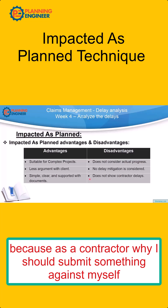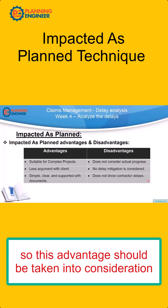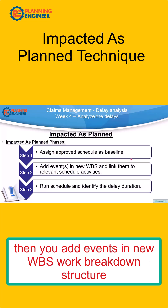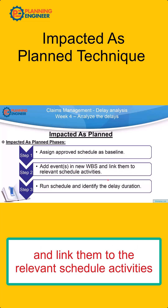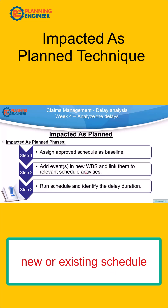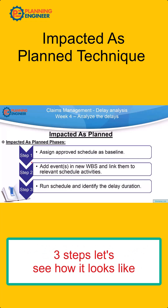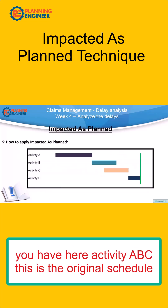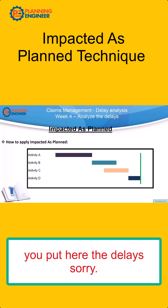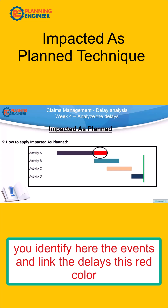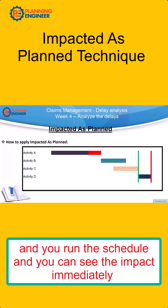Impacted as Planned is very simple. All you need to do is: assign the approved schedule as a baseline, then add the delay events as new work breakdown structure items and link them to the relevant schedule activities, then run the schedule and identify the delay duration. It is very straightforward — three steps. As shown here, you have activities A, B, and C in the original schedule. You identify the events and link the delays shown in red, run the schedule, and you can see the impact immediately.